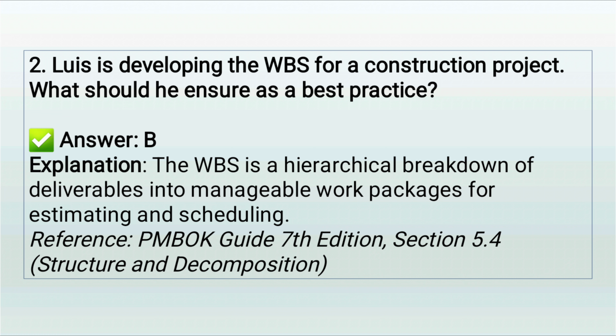Answer. B. Make sure each WBS component represents work packages. Explanation. A lot of learners confuse the WBS with a schedule or a to-do list, but the work breakdown structure is actually a deliverable-focused decomposition of the work. Each component should be a work package. That's a unit of work that can be estimated, assigned, scheduled, and tracked. It's not just tasks. It's structured project scope.